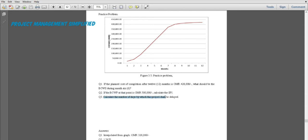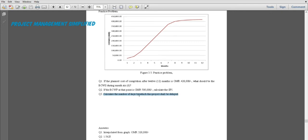The next part asks us to calculate the number of days by which the project shall be delayed. We need to know whether the project is ahead or behind schedule, so let's calculate the schedule time at completion. The original duration is 365 days, which is one year or 12 months. We divide 365 by the SPI of 1.5625 and we get approximately 233.6 days.